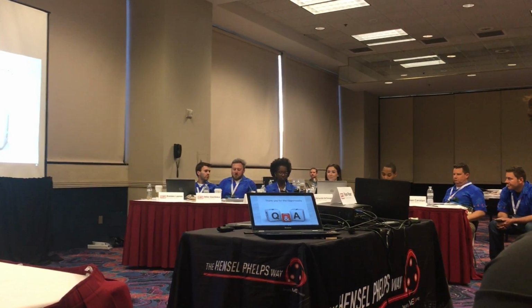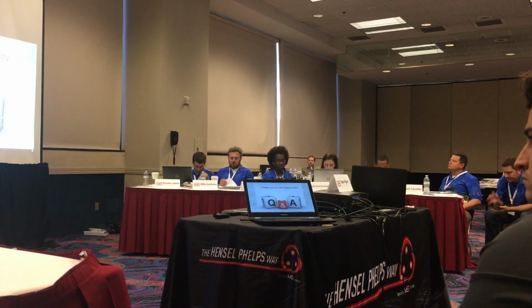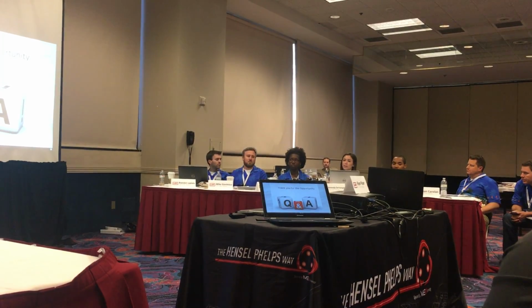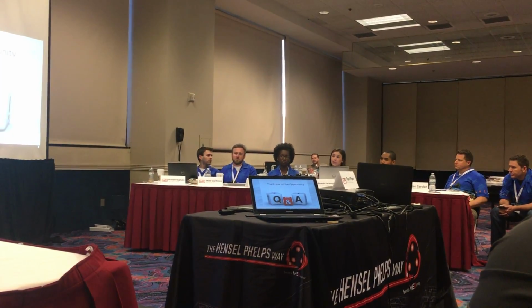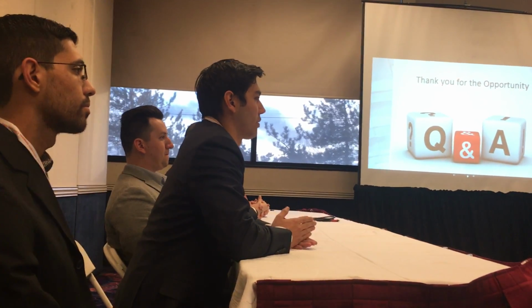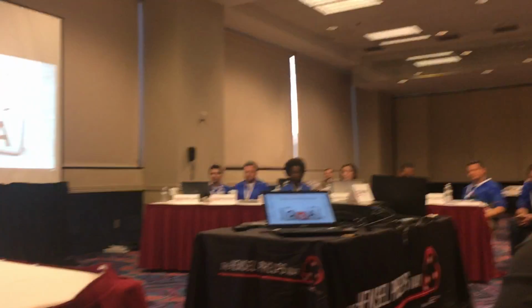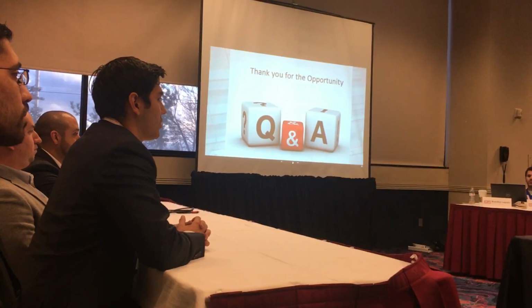Really good. Alright, I know you guys chose RF LLC for your RF shielding. And one of the main reasons in your review was that they held their bid for 90 days. What were some of the other risks that you saw associated with the 60-day hold that you couldn't maybe work out, seeing the 90-day? Well, the reason I did that was because of the type of project that it is and the type of work. I wanted to make sure that everything was covered and that we checked everything and weren't missing anything when we looked through the proposals.